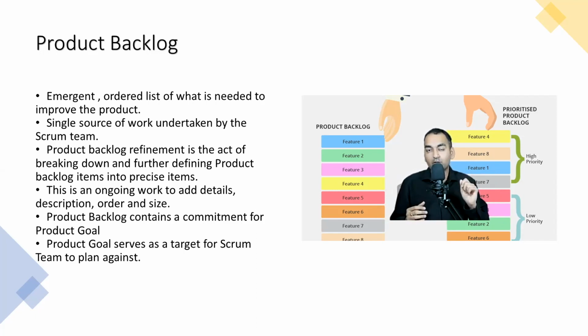And if you have not looked at that video, I highly recommend you first relook at the entire case study and then come to this theoretical part of it. During this refinement session, details, descriptions, order, and sizing can also be done, which means given a feature, its details might be added. You can append documentation, the relevant one. Links can be provided.